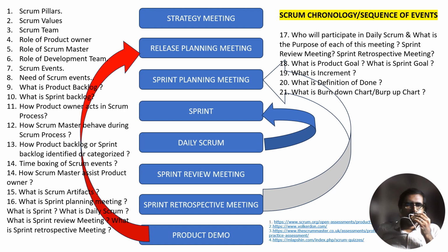The product backlog contains a list of requirements, generally in the form of user stories. It is also created during the strategy meeting. It is arranged using the priority from the product owner, based on which one adds how much business value to it. The prioritization process may also involve inputs on risk involved within the user stories.